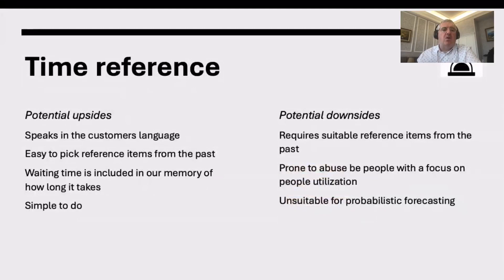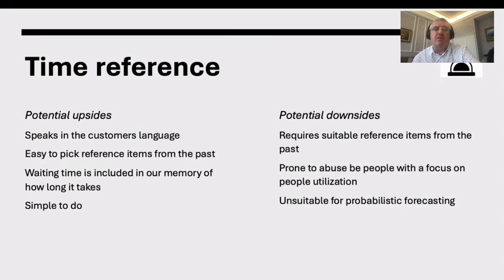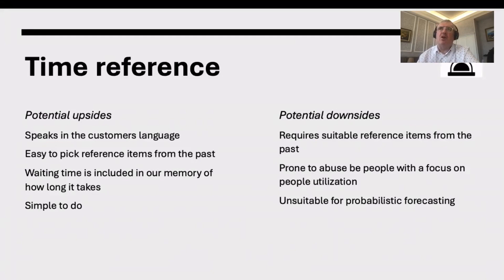Time reference is where you look at something you did, say, a year ago that took two weeks. It speaks the customer's language because it talks about time, waiting time is included, and it's simple. But it requires reference items from the past and can be prone to abuse by people focused on keeping everyone busy — making sure all the time adds up so there's no slack. It's also unsuitable for probabilistic forecasting.